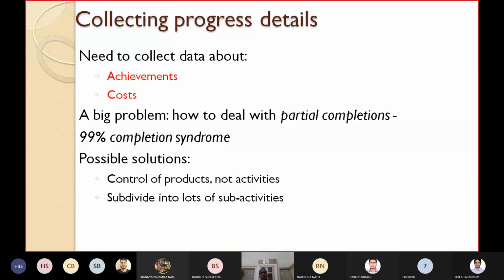As a rule, the manager should try to break down the long activities into more controllable tasks of 1 or 2 weeks duration. I have already told you about the WBS, the work breakdown structure. You should try to develop the whole project into some activities.